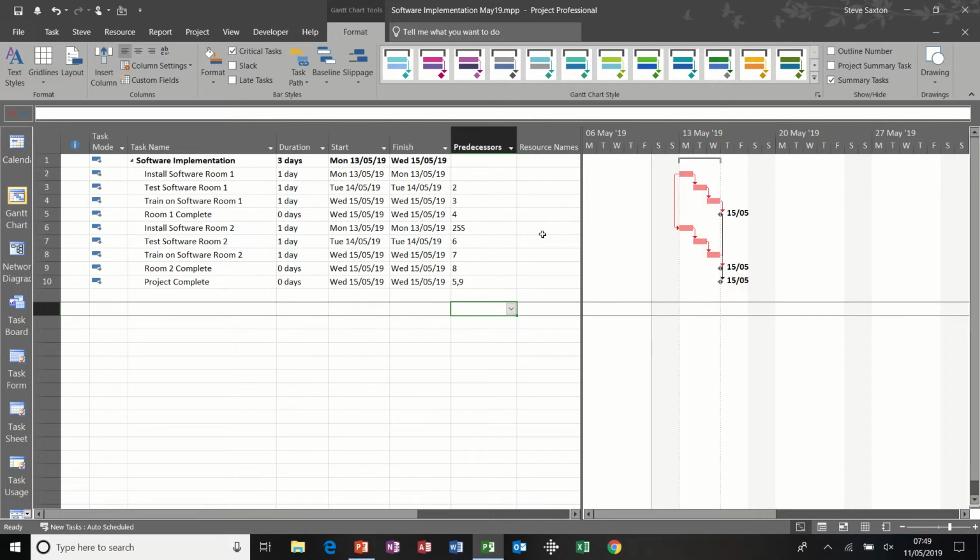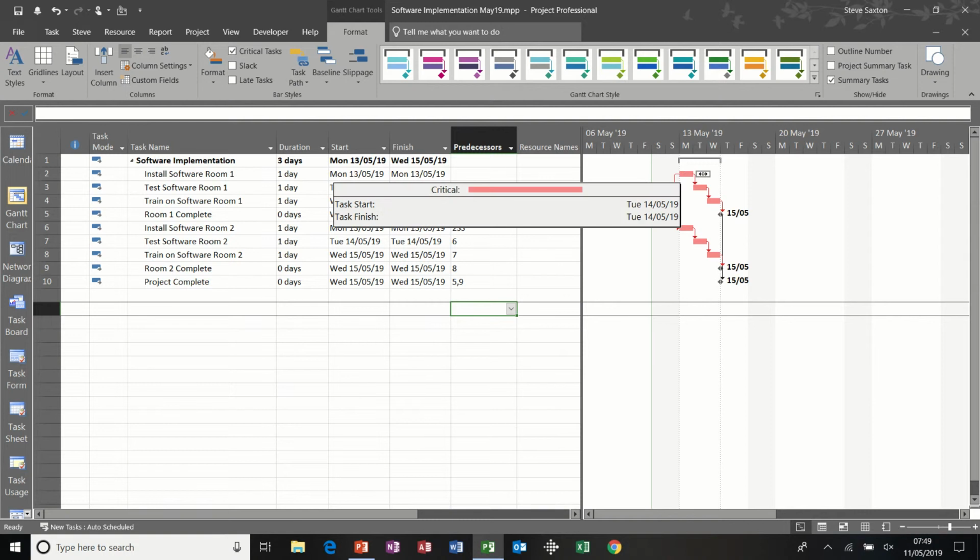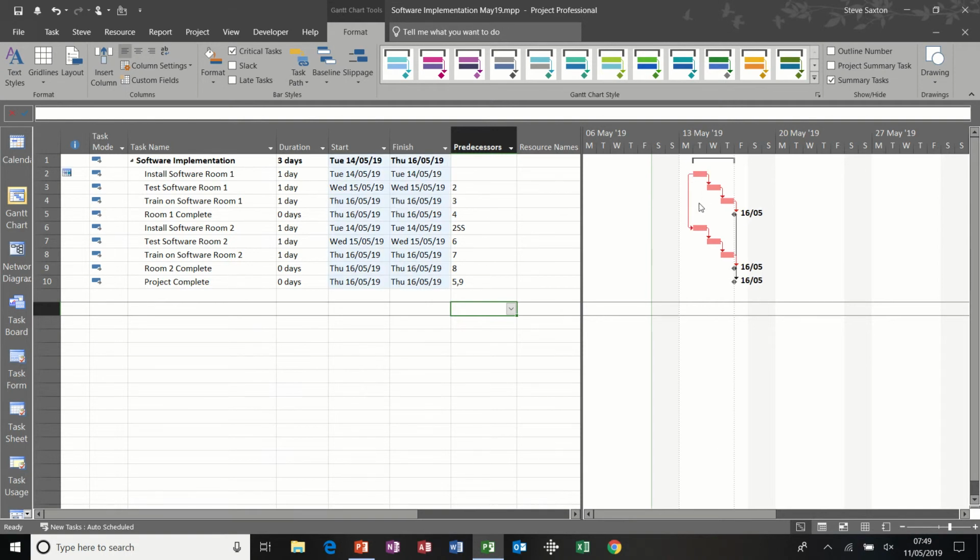So basically the start of the top task will dictate when the start of this bottom task can happen. So for example, if the chief engineer is delayed, and if I pull all these tasks forward a bit, everything is either pushed forward by that top task or pushed forward by this link here for this second set of tasks. I'll just undo that to bring them back. Now